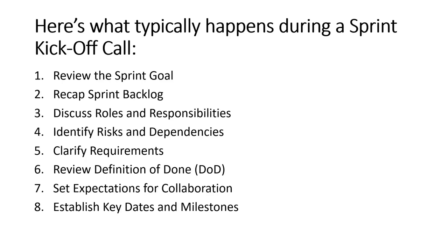So in this step, basically what we do is give the overview of the user stories that have been identified for this particular sprint, and highlight the most critical ones, then the high priority items, right? And confirm that the sprint backlog is finalized and aligned with the team capacity.